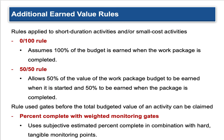Additional earned value rules applied to short-duration and small-cost activities: the 0/100 rule assumes 100% of the budget is earned when the work package is completed. The 50/50 rule allows 50% of the work package budget value to be earned when started and 50% when completed. To use a simple analogy — it's like cutting the grass for your parents. I'm going to pay you $20 to cut my grass: the 0/100 rule gives you nothing up front, $20 when done; the 50/50 rule gives you $10 up front and $10 afterwards.